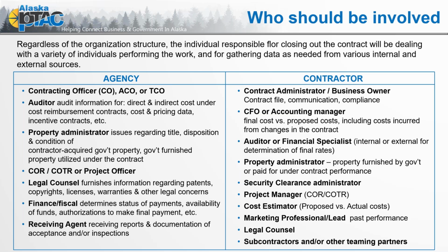Legal counsel, whether internal or external, is it needed for this particular activity? If you're looking at the same list that the contracting officer is looking at, you know, there are patents, copyrights, licenses, warranties, then maybe we should have that legal counsel. Is there anything, or at least a practice developed, if we don't have in-house legal counsel, to make sure that we're following through if any of that is applicable for your contract. And of course, one thing that is not on the agency list is subcontractor and other teaming partners. So as part of that contract closeout, do we have all of their final invoices, their final comments, and of course, write-ups, evaluations, and we'll talk about that again moving towards the end of the presentation.